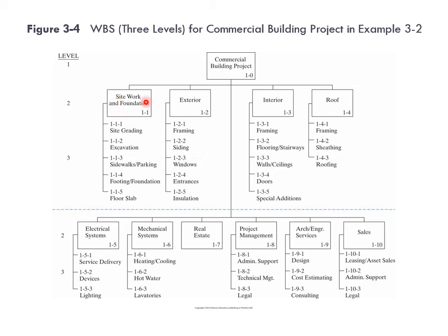For example, the contents and requirements of this work element are the sum of the activities and resources of related sub-elements. Also, a project WBS usually includes recurring costs such as operating and maintenance costs, and non-recurring costs, for example, the initial construction costs and so on.